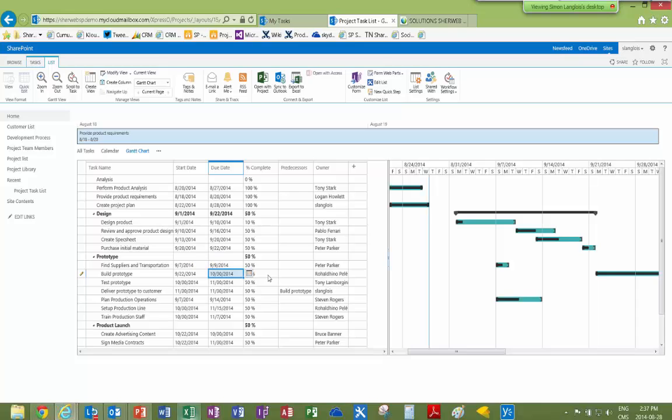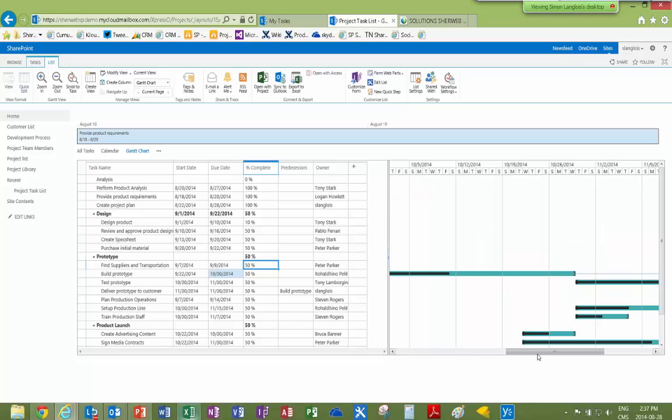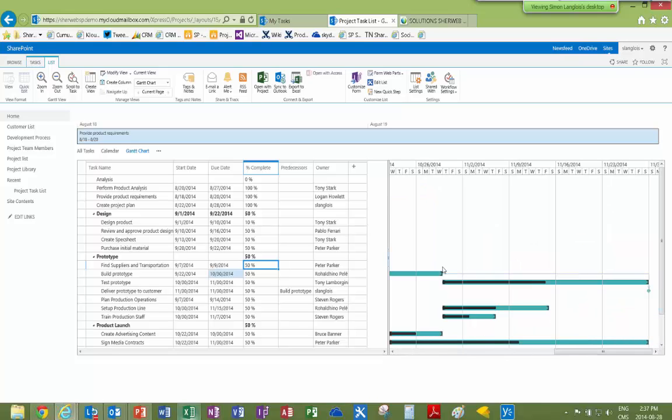We're going to test it right away if you want, but if I'm changing the date here, the delivery date did not move. So there's no calculation done between dependencies. So from what it's dependent on, it will not push forward the following task. You really need Project to do that, because this is a calculated value.